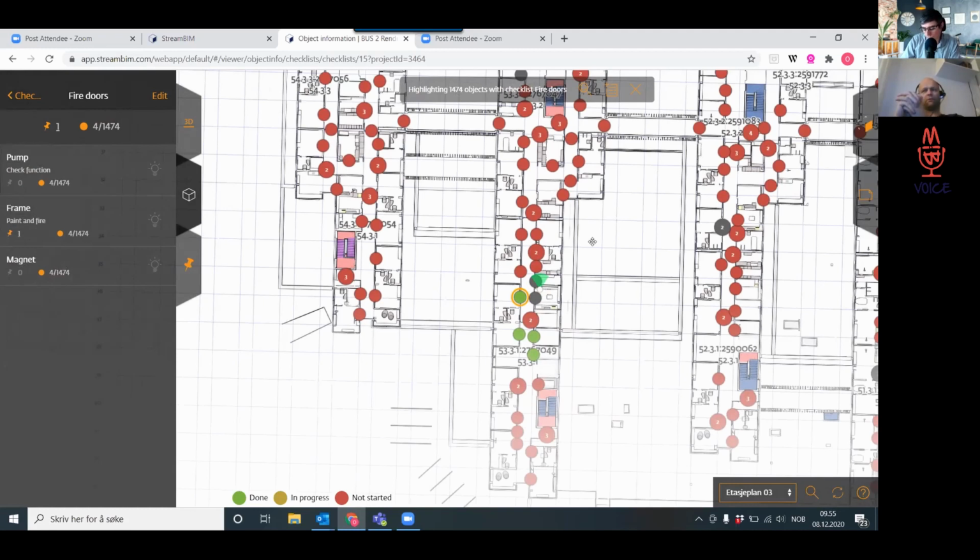The big problem is to have an overview of everything you haven't checked, which in traditional checklist manner is much more difficult to control, because it's always a piece of paper, and the piece of paper is used to show everyone that you're on top of the things, while this is more something you can plan up front and see how far you are in completion of the project. Yeah. Or your contract or whatever. Yeah, that makes sense.